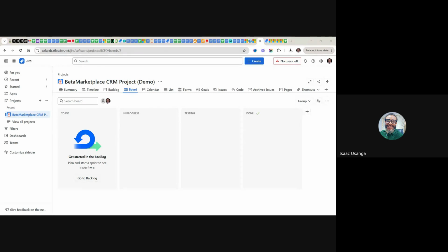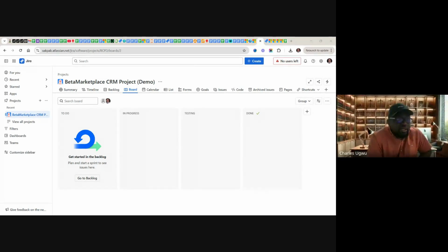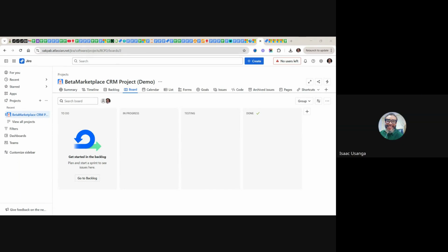Good evening, sir. I'm on this definition of done. I know it's different from acceptance criteria, right? Acceptance criteria is a criteria you use to test a particular user story. A definition of done is holistic, when you've done everything that needs to be done for each requirement in this sprint.